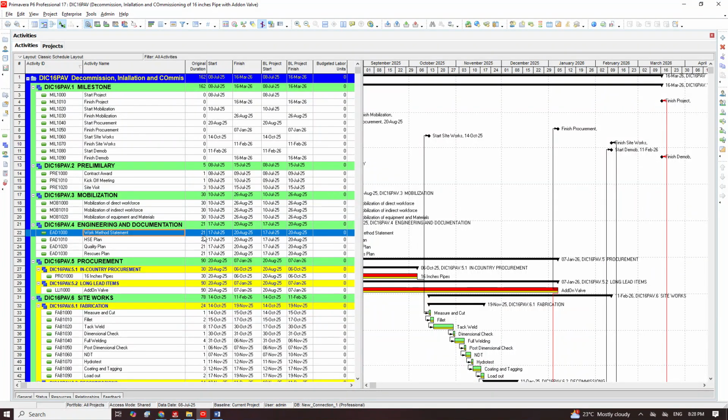But if yes, I need to know how many hours he might be putting in. Now I can use my discretion, say, look, project manager is everywhere at the same time, right? It means he might not give this document more than 2 hours. So I will assign project manager only 2 hours or 1 hour in this document for 21 days. I can't assign him 8 hours. So you will see the way you assign someone, which means project manager can work on this document and work on another thing the same day because he has at least 8 hours to work a day. So he can work on 8 different activities, giving him 1 hour per activity, right?